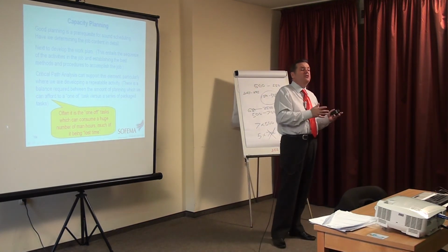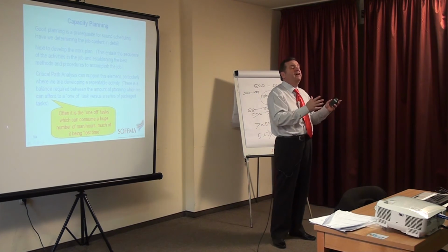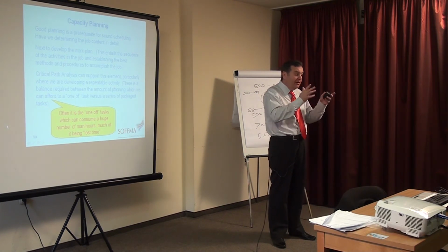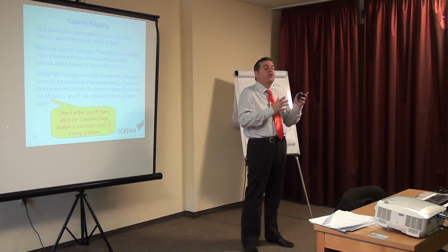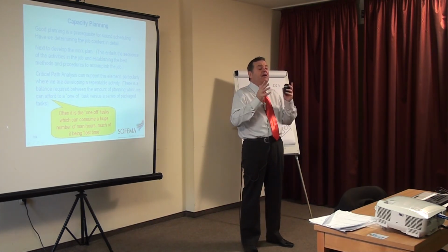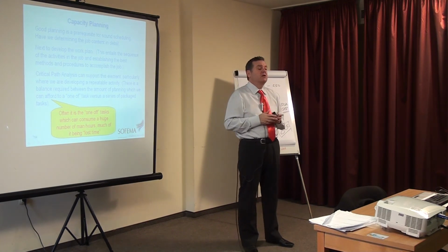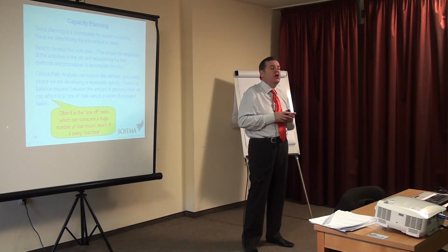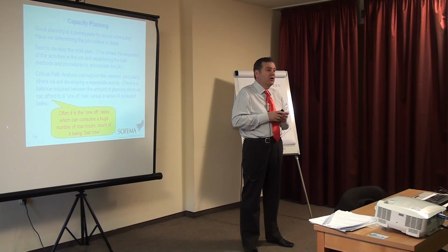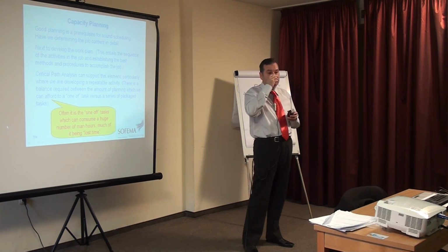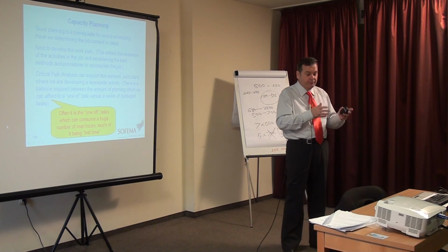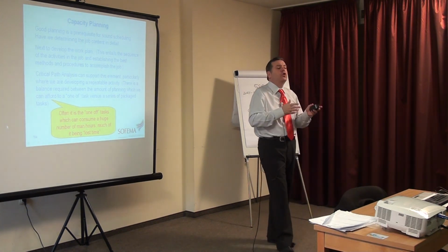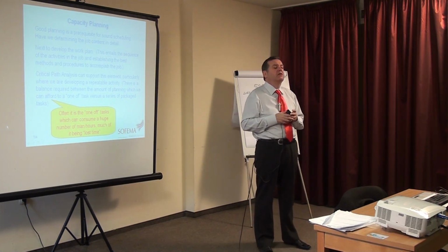Well, when you give me the spare, it's going to take me 1 day to fit the spare. It's going to take me 1 day to close the fuel tank. It's going to take me 1 day to test, and then we're ready for the engine runs. So it's the last day of the check, so we're now 2 days late. And this is understanding the critical path. And when we're managing material during a maintenance check, we can manage the material in accordance with the critical path understanding.